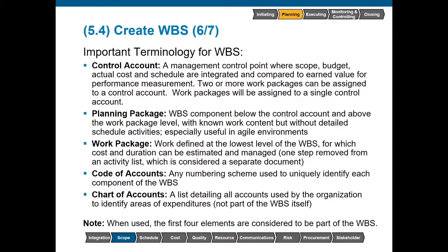Planning package. This is a component below the control account, but above the work package level. This is where we know that we have to do some type of work, but we haven't really planned it all out. So rolling wave planning is what we're using as a technique, and we know that we will get there.